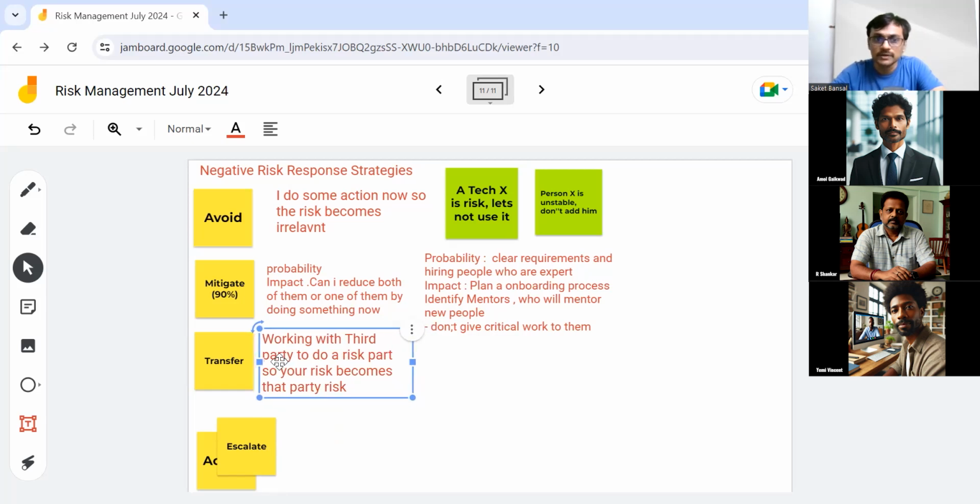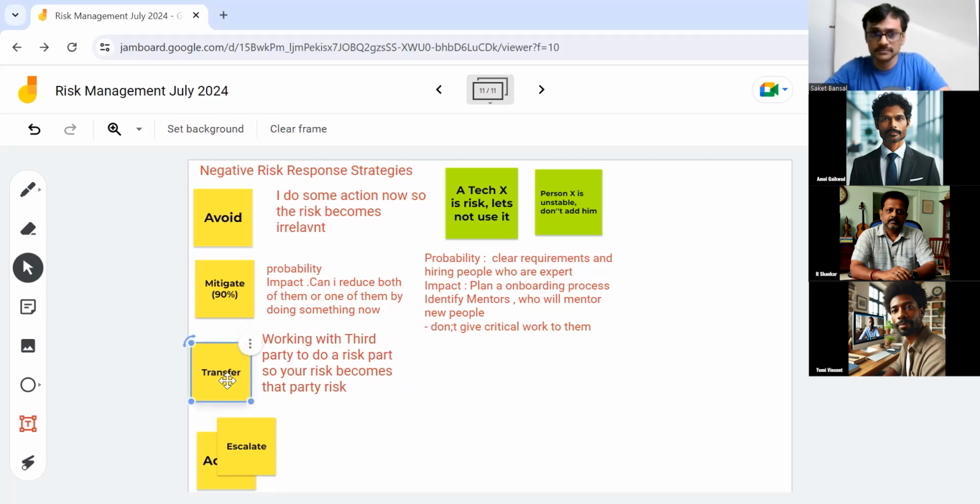Yeah. So you are doing a contract with the bank and saying that I will give you this money. In future, I want to have this much dollar and you need to give me at this much price. Yeah. So there's a contract. They'll say, yeah, we are going to do it. Yeah. And you need to give this much extra money. So now they are taking care of the risk. They are taking care of the exchange rate fluctuation risk. If it costs more money, yeah, it is a bank loss. If it is not fluctuating that much, that's the bank's profit. Yeah. But for you as a buyer, you are paying fixed money.